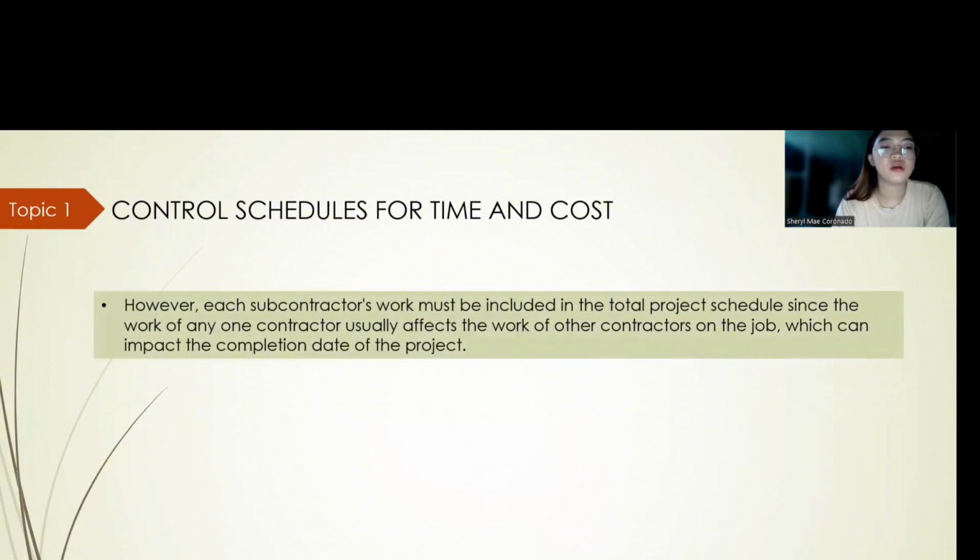So, however, each subcontractor must be included in the total project schedule, since the work of any one contractor usually affects the work of other contractors on the job, which can impact the completion date of the project.